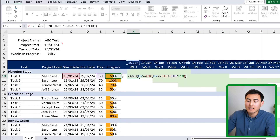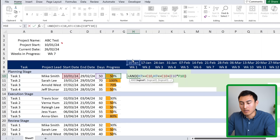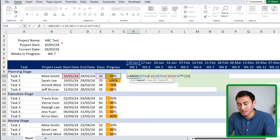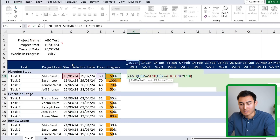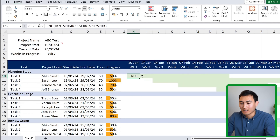Adding parentheses makes the formula clearer. For dollar signs: lock only the row for the header date column (dollar sign on the row number), and lock only the column for the start date, end date, and progress columns. This lets the formula move both across columns and down rows correctly.